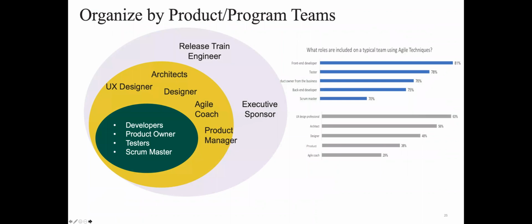So one is to start having the conversation around product teams. Number 2 is to start actually organizing by product teams, putting product teams around your organization, your core team of developers, product owners, testers, Scrum Master, Kanban leader, whatever delivery approach you're going to use. That's your core team, and they are dedicated to a product. The other bands around this core team are resources needed to support those core teams that may not need to be there every day, but when they're there, they are allocated 100% for the duration of the time they're needed on that sprint. And then the third band out are the folks whose expectations you need to manage, such as your executive sponsor, security, and a person who might not be listed here but is definitely involved, the release train engineer.